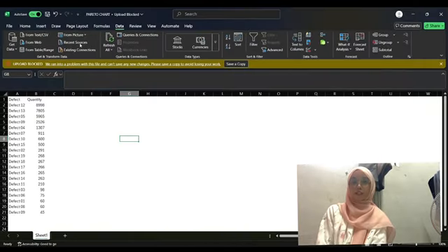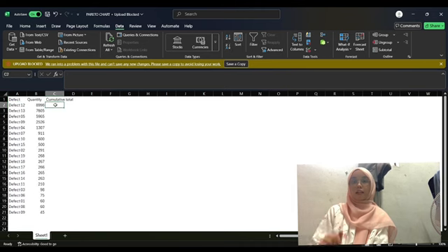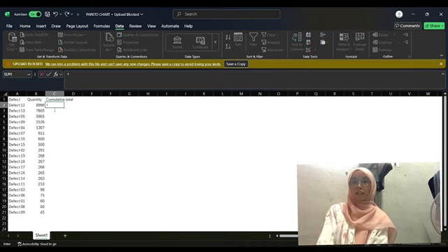We can use this sample data as example to create Pareto chart to analyze and visualize. It has 5 steps. First, sort values from high to lowest. Second, calculate the defect cumulative total.